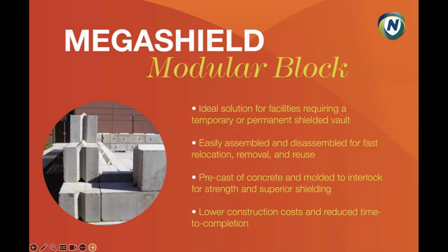The third would be accuracy and testing. Each block can be tested for any leaks, any damage to the block that was made during the curing process prior to it being installed. So each block is serialized, and it's proof of concept before it arrives on site.